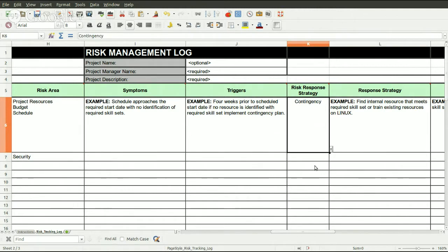Then you have contingency. Contingency is basically you have a plan A, a plan B, a plan C. Maybe there's a risk that you're going to place your organizational staff in New Orleans, and now you have Hurricane Katrina, severe storms down there. Now you have to say, okay, my contingency is that if something happens to this particular location, we can move them north 100 miles to this other location, which is maybe a warm, hot, or cold site for a contingency spot. Those sites, warm, hot, or cold, just deal with the amount of time it takes to actually get that facility operational. And so you just say, I'm going to move into X facility if something were to occur. So that would be contingency.